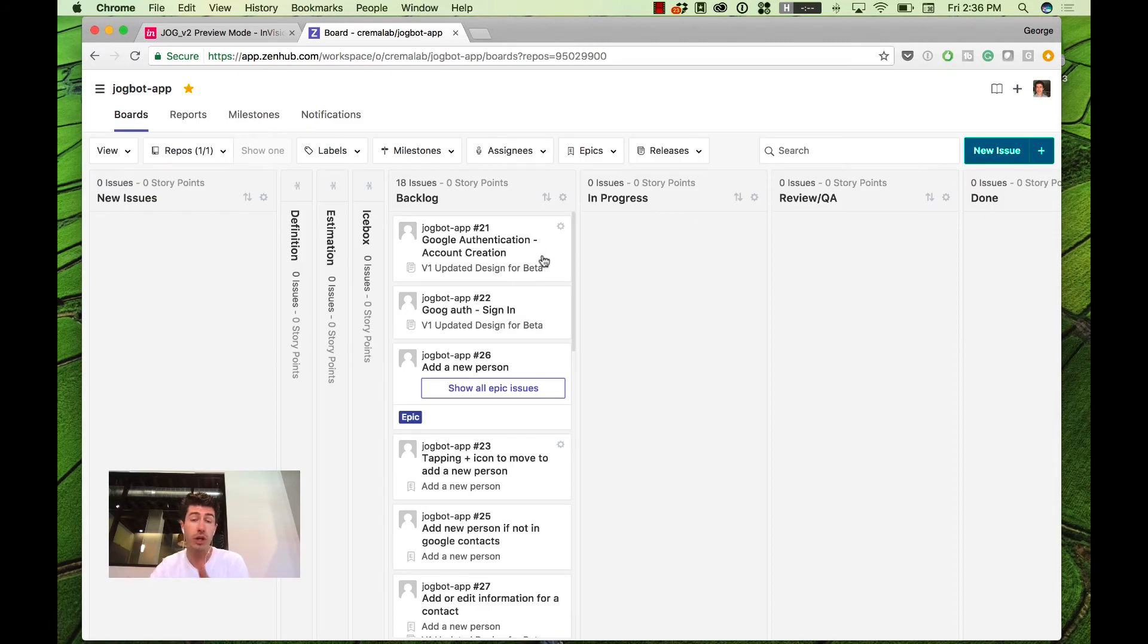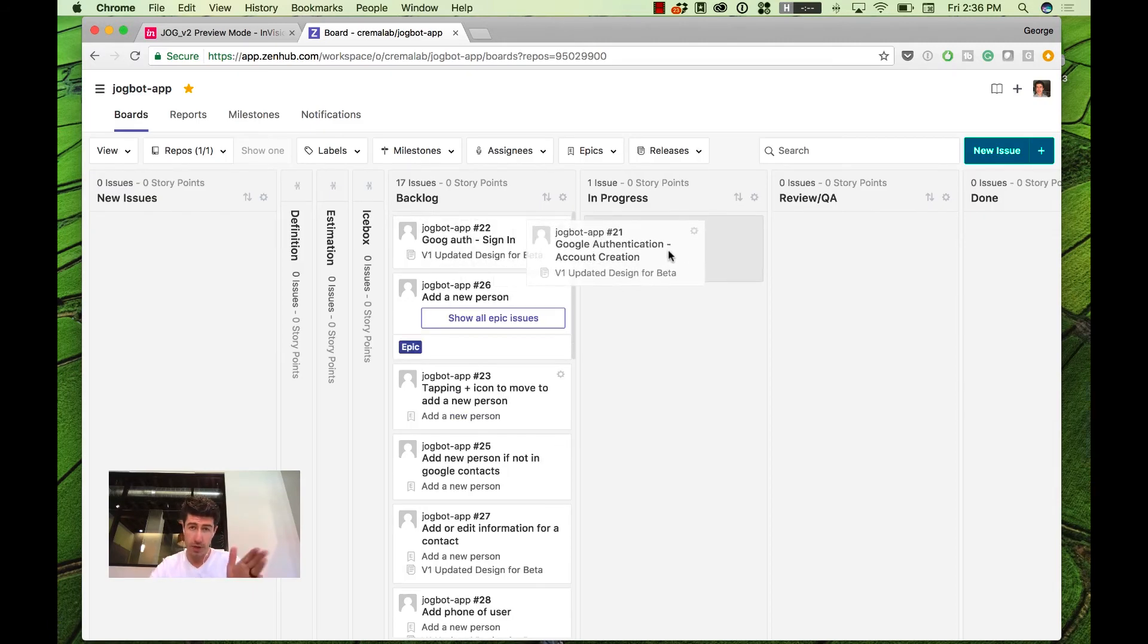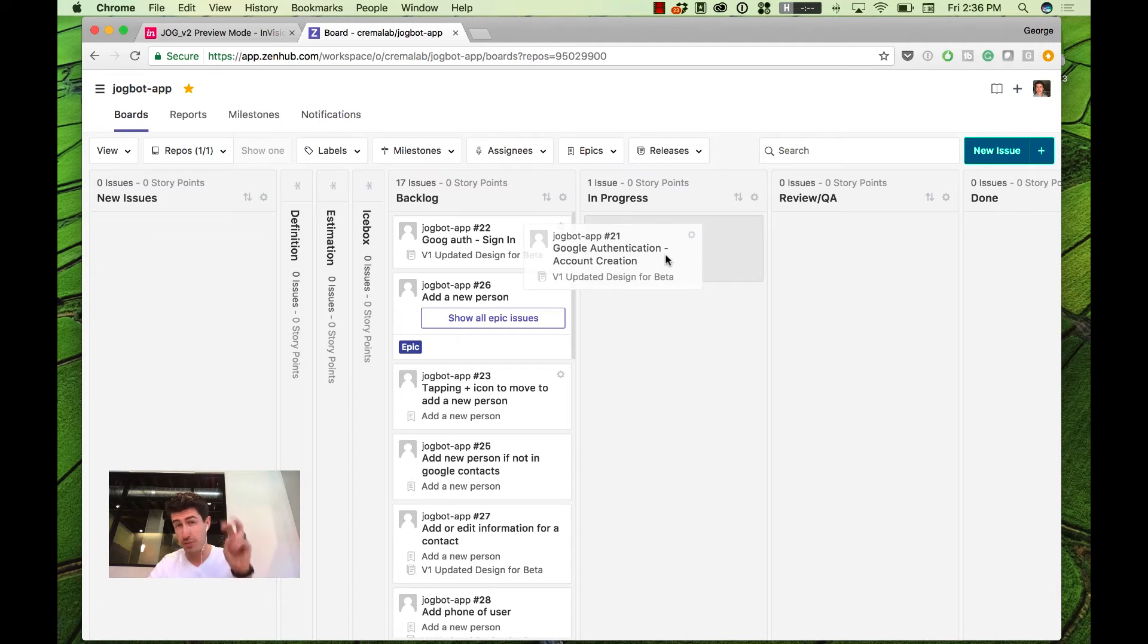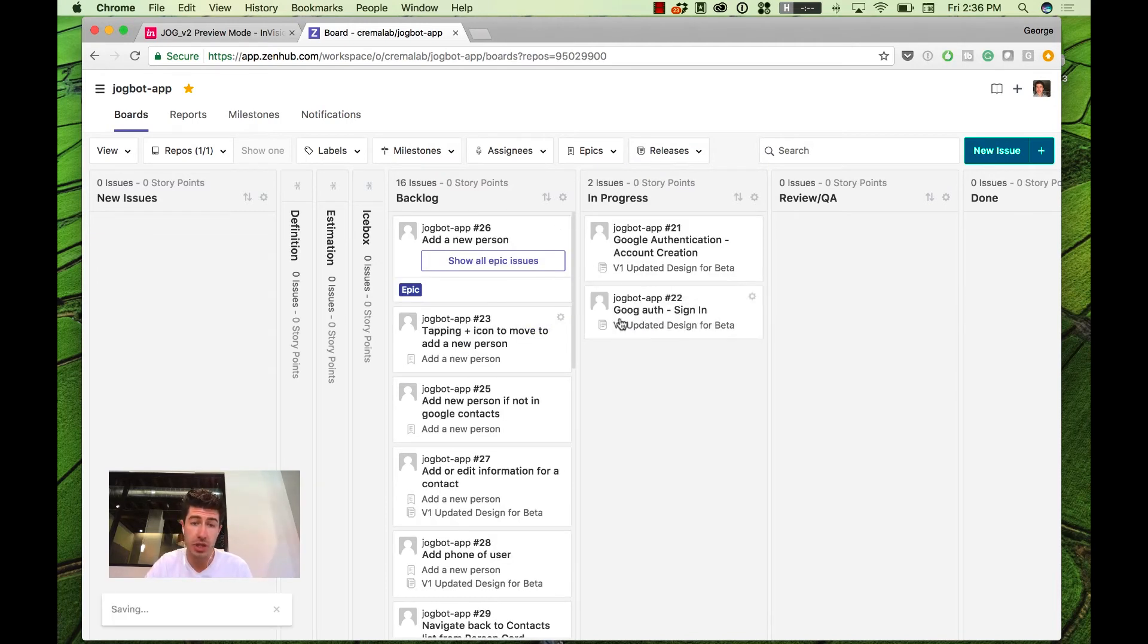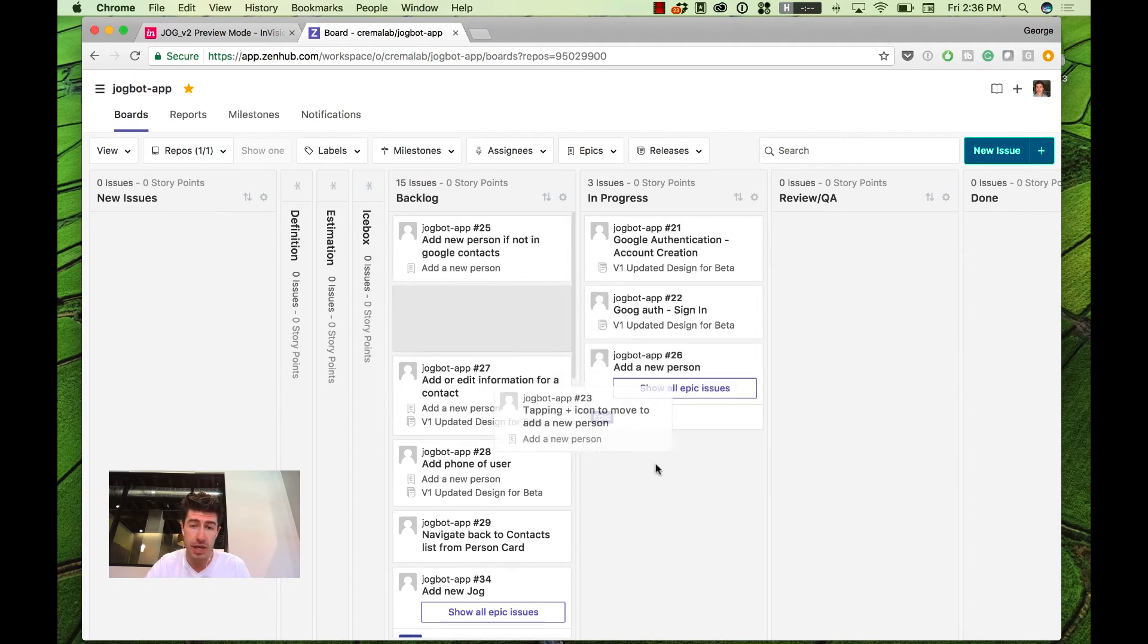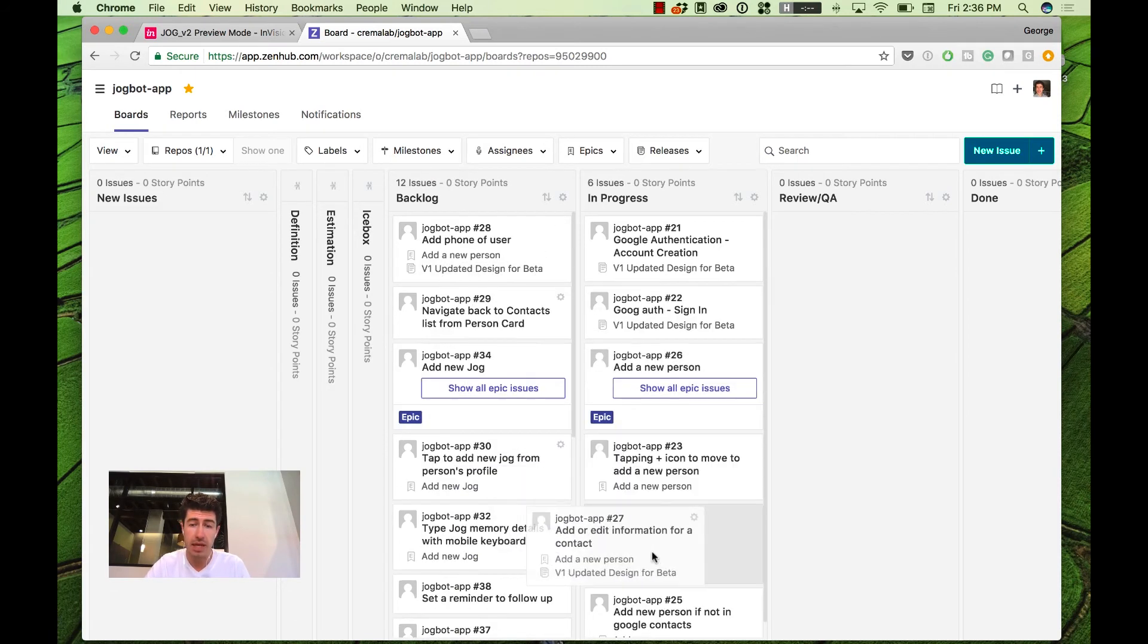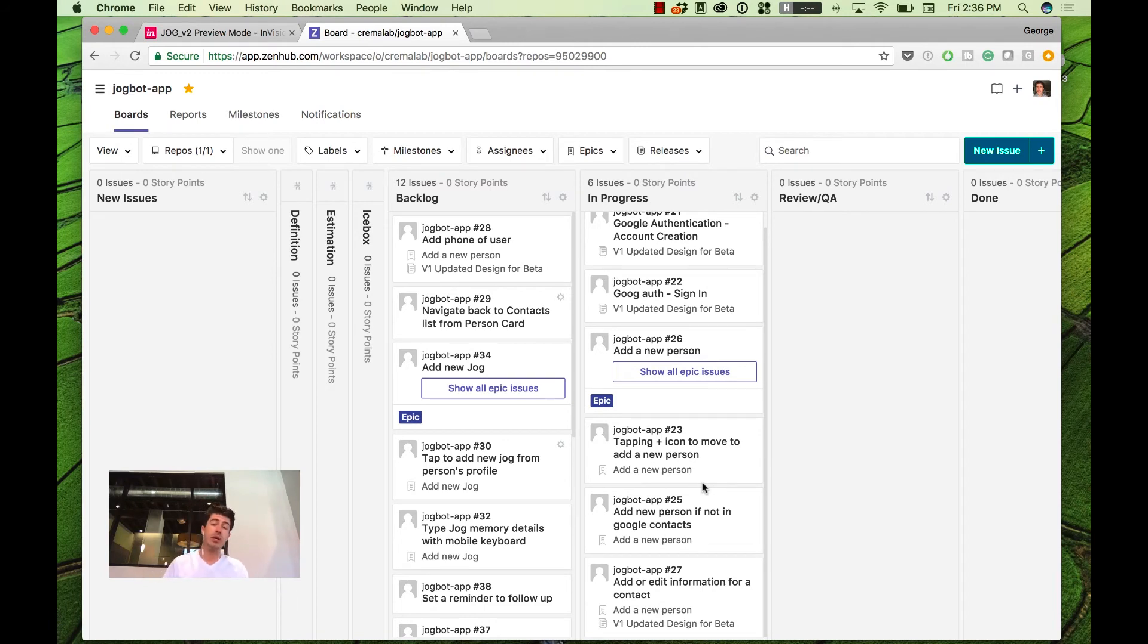When we're ready to move forward, we're going to use Zenhub to say, what are we working on for the next two weeks in this, what we call sprint. So we might say, you know what, I'm going to get that Google authentication in place. I'm going to get adding a new person in and being able to edit their information. That's quite a bit of work right there, but we would estimate it. And then we break it down into how much we think we can accomplish in those two weeks.